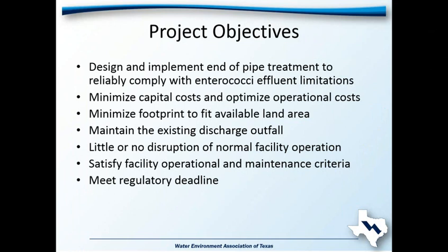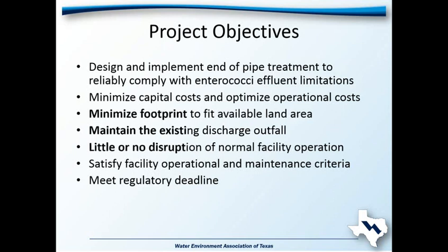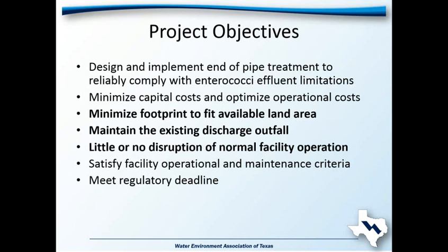The project was to design and implement a system to meet some bacterial enterococci effluent limits and keep the facility operating during the conversion. We were challenged in a couple areas. The big challenges: we didn't have any footprint. We had a very limited amount of hydraulic gradient to work with, and we could not move the discharge outfall at all.